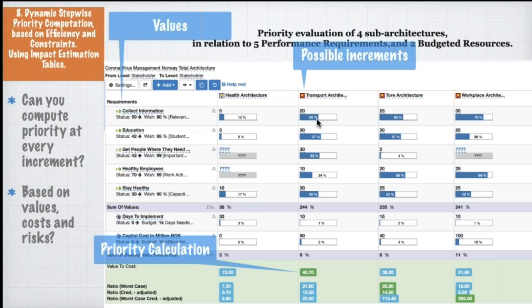It really is not exactly 50. Then we say, what is your evidence that it's 50 plus or minus 10? Give me the facts. Give me a case study, a measure, an academic paper. I don't care. And then give me the source of it so I can look it up and check it. We then assign a credibility level from 0 to 1.0, where 0 means you're just guessing, you have no evidence and no good sources. 1.0 means your sources are unimpeachable, solid, and this is going to happen.